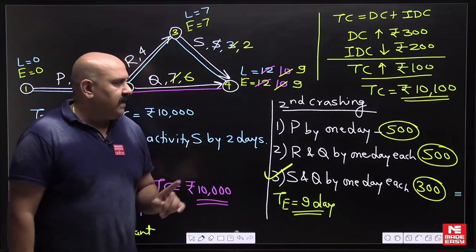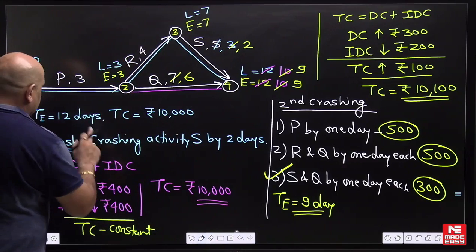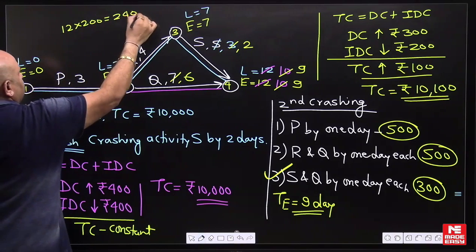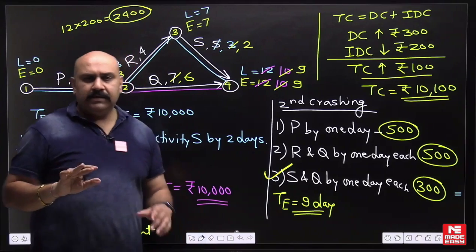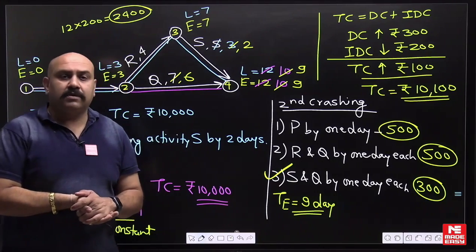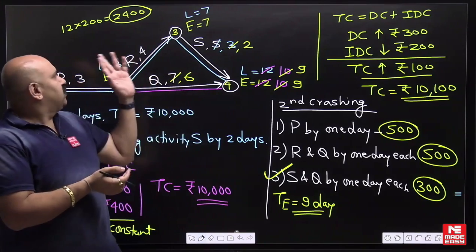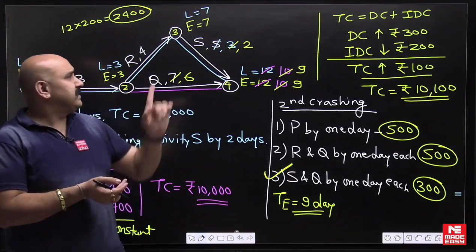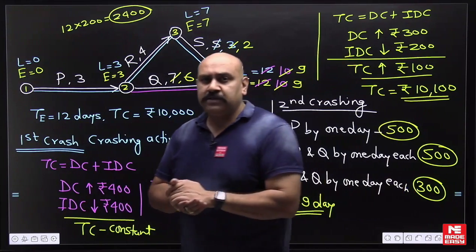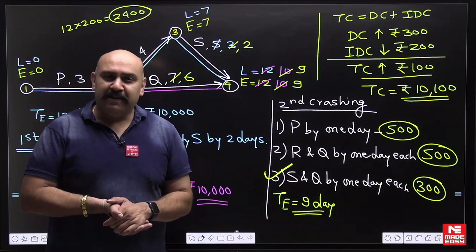The answer is rupees 10,100. In some solutions you will find 12,500 because they started by taking 10,000 as direct cost only and added 12 × 200 = 2,400 separately. Do remember: whenever they ask for total cost of the project, it means total cost under normal working condition. That was one of the good questions from crashing. Hopefully you liked it — please share and subscribe to the channel Medizy.